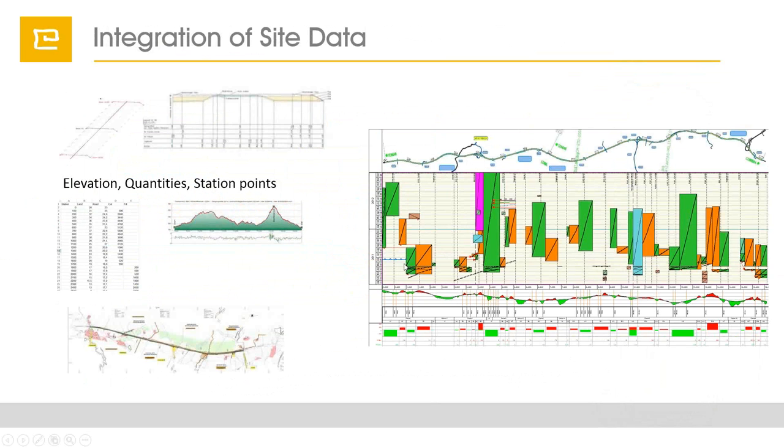The planner does not need to calculate the quantity in each section. TILOS calculates that automatically and sets the duration of the activity. So the first work in setting up a project is usually getting all this geo information into the schedule, into the plan, or into TILOS before creating activities, because then we can make use of all these quantities.